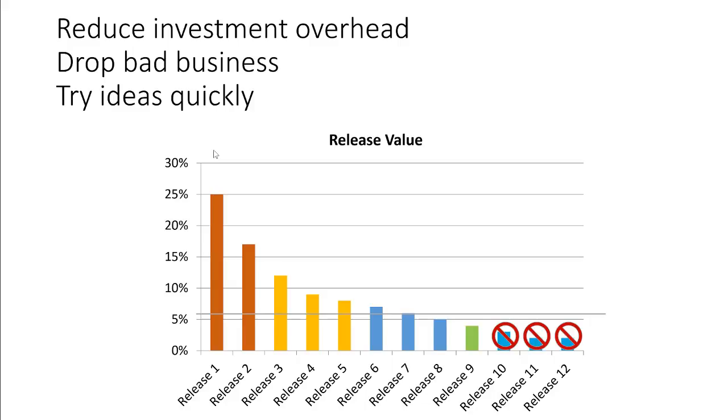That means that they won't take on any new projects that will not return 6% ROI in the second year. So the question I would have then is, if that's the case, you won't take on a project, why would you take on a feature that won't return more than your ROI threshold?